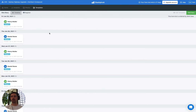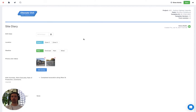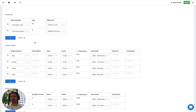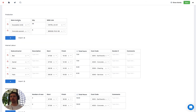Here we are in Dashpivot looking at a site diary template, and we have many forms that have been filled out so far. If we open one of them, I just want to show you exactly where our data is going to come from. We're going to look at pulling information from this production table here. You can see we've got a column for the work activity — it's important that it's set up as a drop down list — and then we have a column for the actual quantity associated with that work activity, which is also linked to our WBS link. So we have our quantity linked to two different variables in this table.